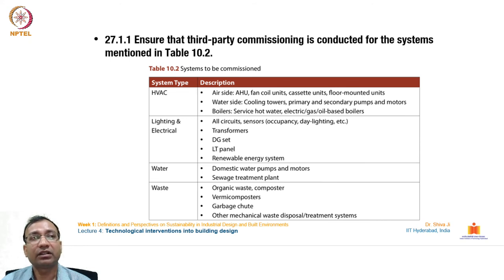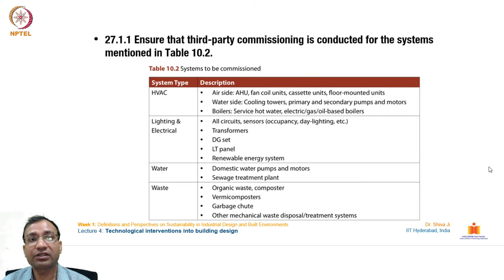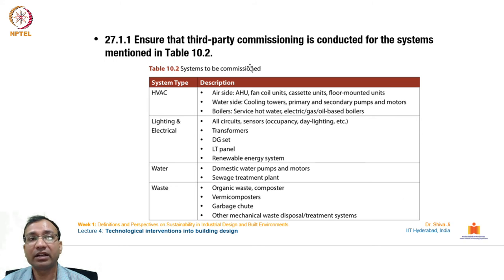The commissioning table covers key building services including HVAC (air-side: AHU, fan coil units, cassette units; water-side: cooling towers, chillers, primary and secondary pumps, boilers), electrical and lighting (all circuits, sensors, occupancy/daylighting controls, transformers, DG sets, LT panels, renewable energy systems), and water and waste systems (domestic water pumps, sewage treatment plants, organic waste composters, vermicomposters, and mechanical waste disposal systems).